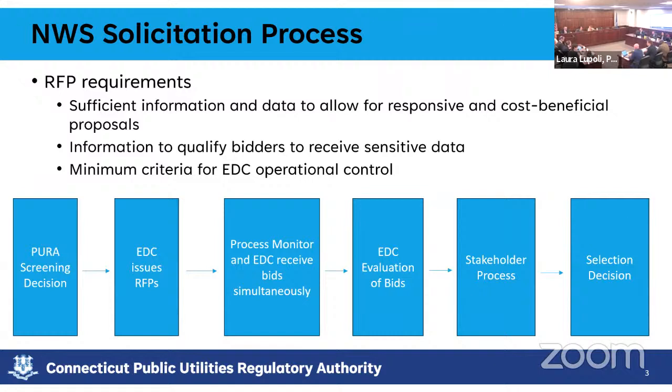If you're bidding in, again, a battery, you might need to do site visits. You might need to find properties to put that battery on. All of that negotiation might take time in order to complete a bid upfront. So it is very well possible that these delays, in all likelihood, come from the bidding entities, not from the EDC side, because most of the work in that process ends up being on the bidding entity.